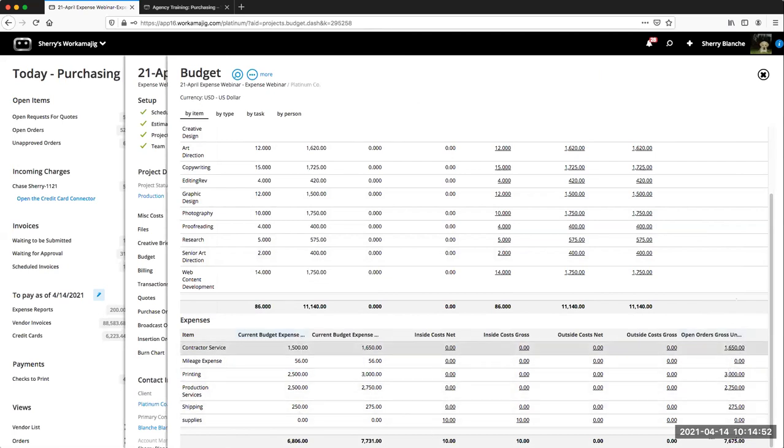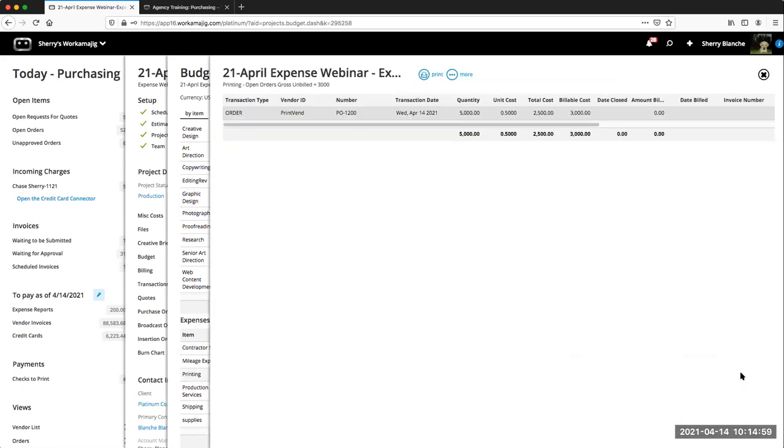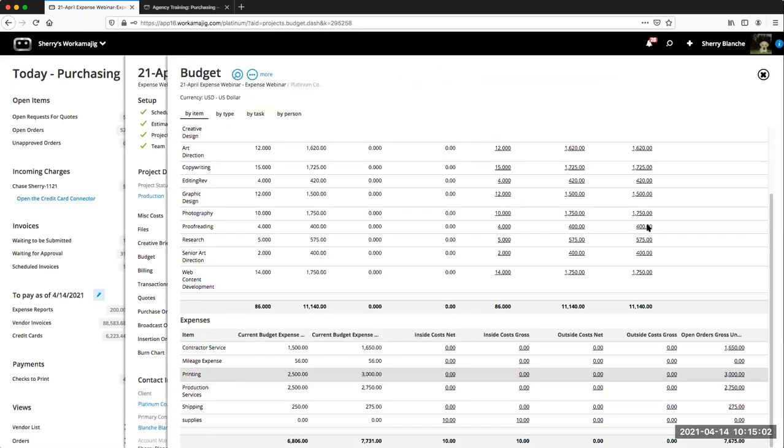So I not only have a budget and these budgeted amounts, but I also have some additional details that I can click into to see, well, what is the actual amount that I now have. Now you can see here that I estimated this, and I can expand these a little more. This is your project budget area. Of course, there's the global project budget analysis across all projects, but this is really what did we estimate and what did the actuals come in at? And is there any difference between those that you can be tracking to see that information quickly?